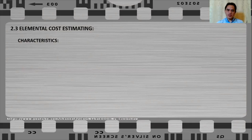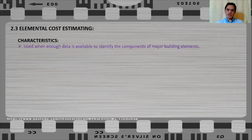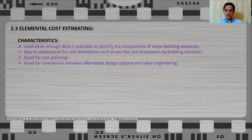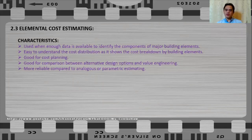Elemental cost estimating is used when there is enough data available to identify the components of major building elements, and it is easy to understand as the cost distribution shows the cost breakdown by building elements. It is also good for cost planning and can be used for comparison between alternative design options and value engineering. Moreover, elemental cost estimating is more reliable compared to analogous or parametric cost estimating.